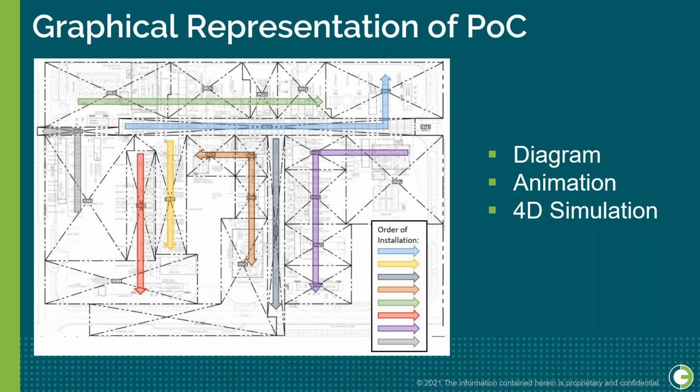Then once you've got a 3D model, invest in 4D playback to tie your model components to the schedule. Watch the plant being built in full 3D rendering. For larger complex projects, these tools will give you an immediate ability to visualize the sequence and correct any errors. And for construction people, that visual stuff is very, very important. That's where people really get a lot of value out of seeing the plan, seeing how it's going to be put together.